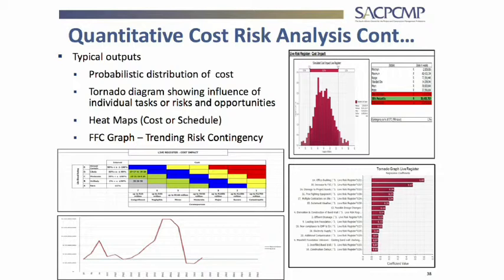Then risk might start coming down again. The board likes to see it drop below the contingency line. We explain: it's end of November, nobody feels like striking because it's nearly Christmas. But we might see a spike if workers come to site intoxicated — zero tolerance means losing resources. Going into December, we've worked the builders' break into our schedule so there's not a lot of risk.